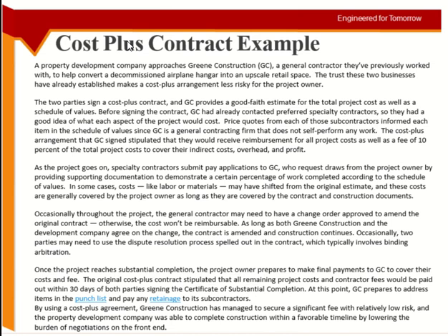So now you see, the main contractor and subcontractors are using different types of contract. The main contractor is using cost plus fixed percentage. But the subcontractors are hired on some other type of contract. Is it mentioned here? No, it's not mentioned. But they are saying price quotes, so basically they must be hired on lump sum basis. So there's a hybrid mechanism.